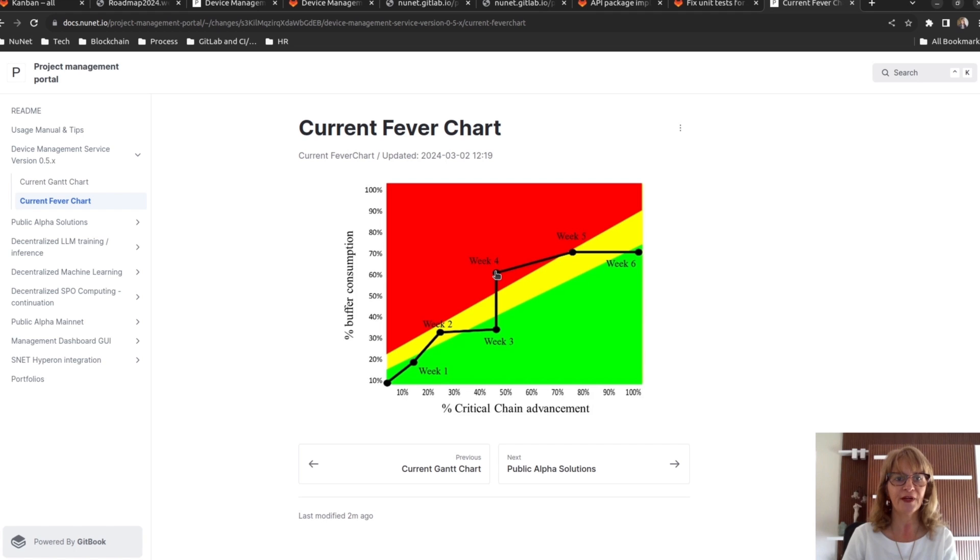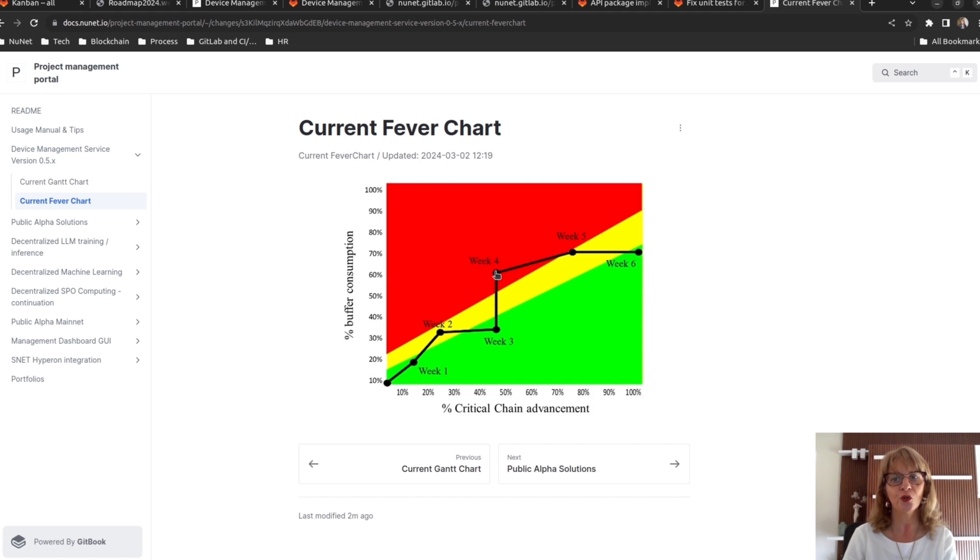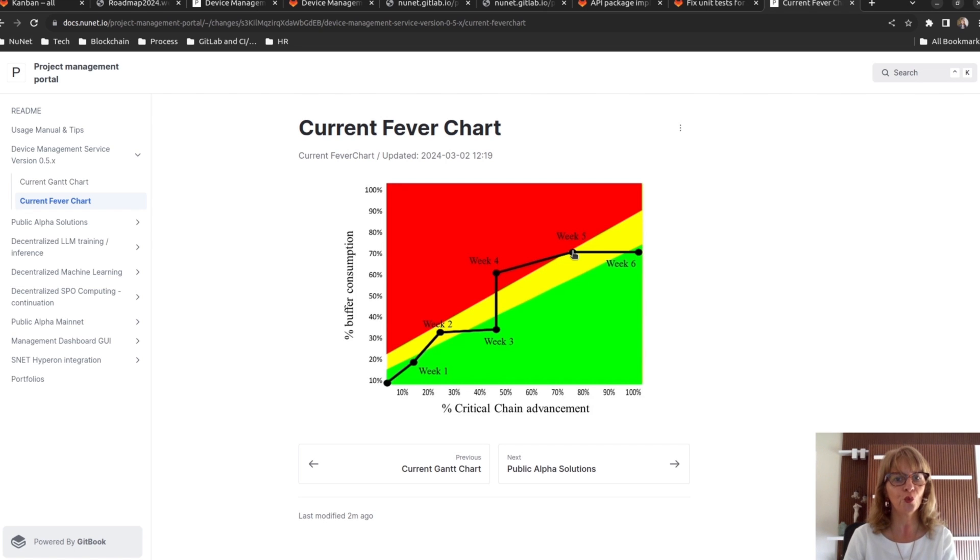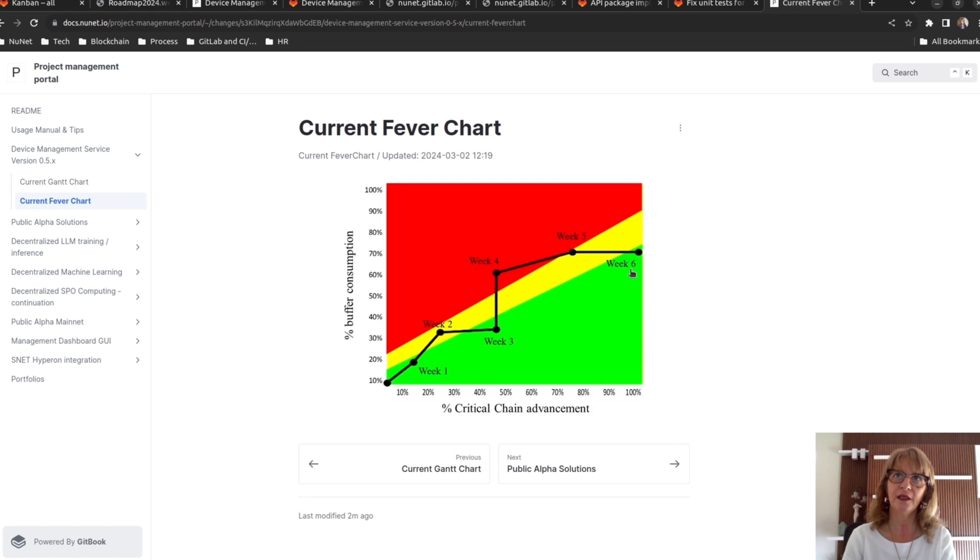There is no progress on the critical chain and the project buffer has been heavily consumed. This situation needs a fast intervention to avoid compromising the project completion date. The next curve shows that the situation has been brought back under control and the project ultimately finished with a slight advance in week 6.